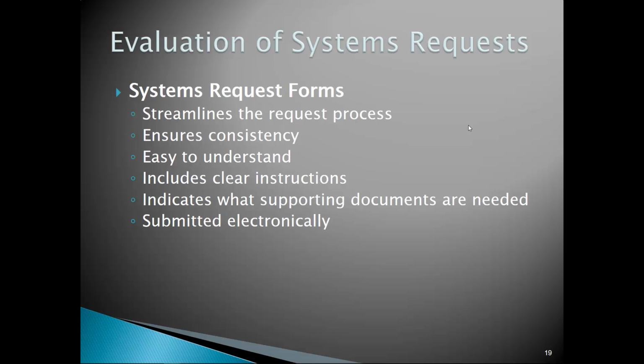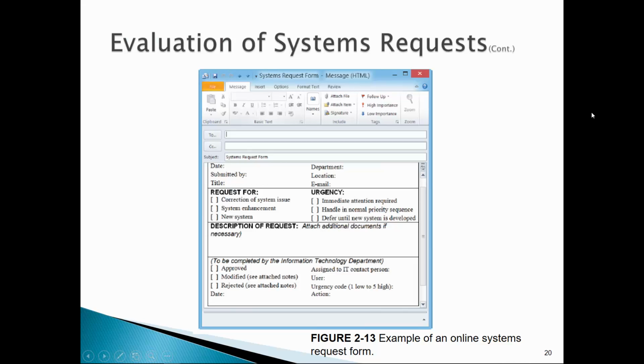A lot of times these are submitted electronically, and we'll have IT systems or databases that we can put these in so that we can prioritize them, and look at a cost-benefit analysis of doing project A over B. Or maybe we need to do project C before project A, because we need, say, additional network infrastructure. Before we can work on streaming video twice a week, we need a network infrastructure that would support that, so that might be a subsequent project that needs to be done prior.